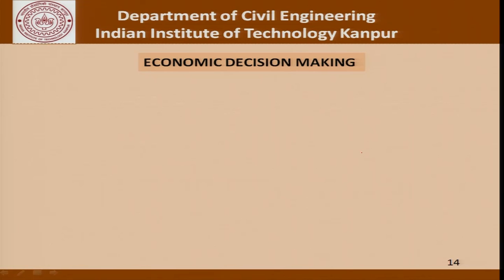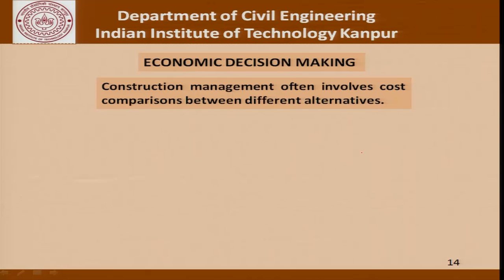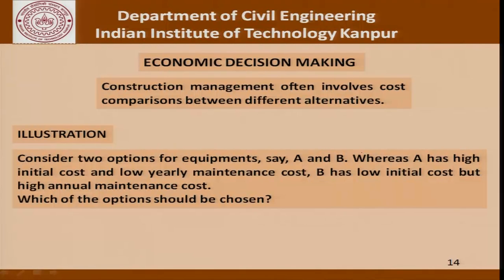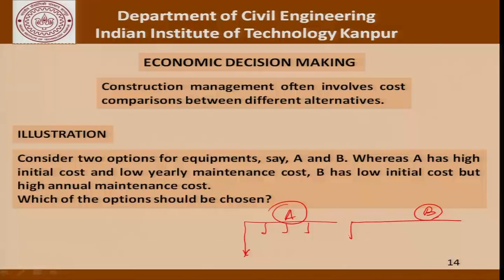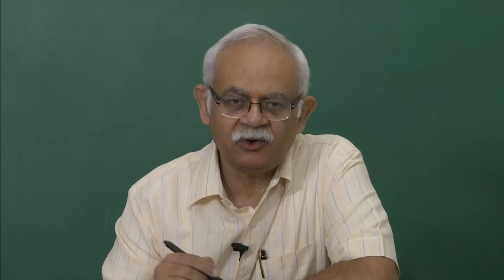Going forward, let us talk about economic decision making. Construction management involves cost comparisons between different alternatives, commonly when buying equipment with different capital costs and maintenance costs. Consider two options A and B: A has a high initial cost but low yearly maintenance, while B has a low initial cost but high annual maintenance. The cash flow diagram for A shows high initial outflow but lower subsequent costs, and for B it is the opposite. We can compare these options using the principles discussed.